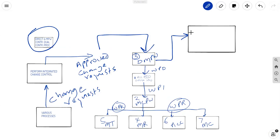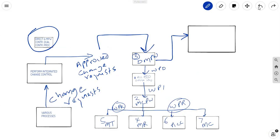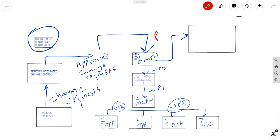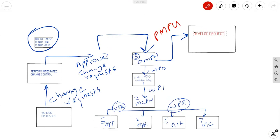Now, if eventually that work does become part of the approved work to be done, only at that point is the transformation from what you have here to what is in the PMBOK guide as, and I'm just going to put this in red, project management plan updates. For these updates to, in essence, become part of the project management plan, they need to get into the project management plan. And that happens in the develop project management plan process.